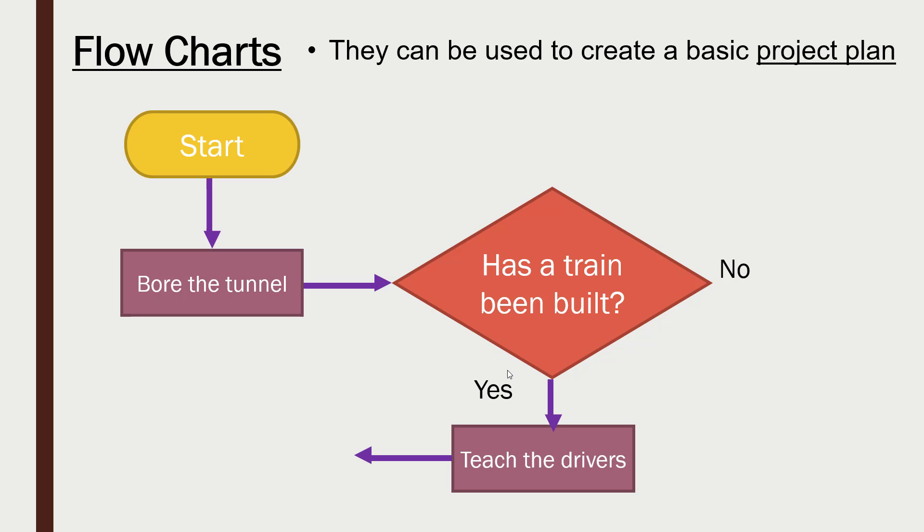If it has been built, we can start to actually teach the drivers. The drivers have got a train to practice on. So this task is dependent on us having a train built. And once they've been taught, we can end it. So we always have a nice clear start and a nice clear end in this very small section of our plan.